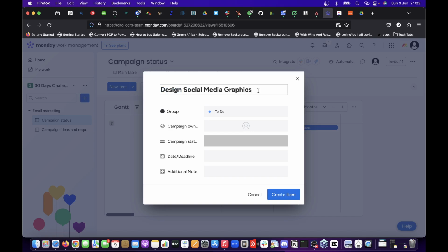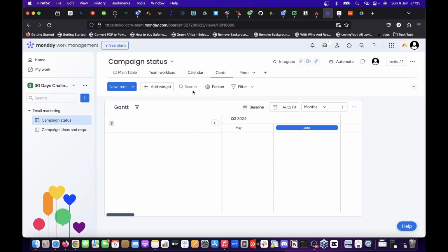So if I assign a task to anyone here, I expect the person to go and make a comment on the task and say seen or I acknowledge, sir. And then you now move. Once you have started doing the task, you can move it from to do to in progress. And once you move that, I'm going to see it also on my own end that this task has moved, which means you have started working on the task. You understand?